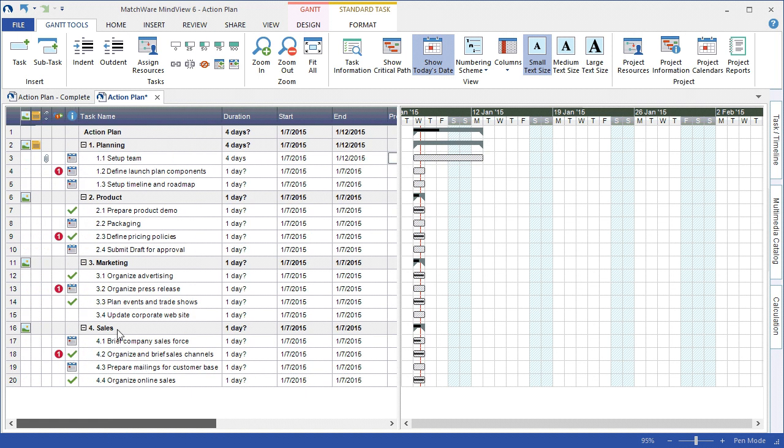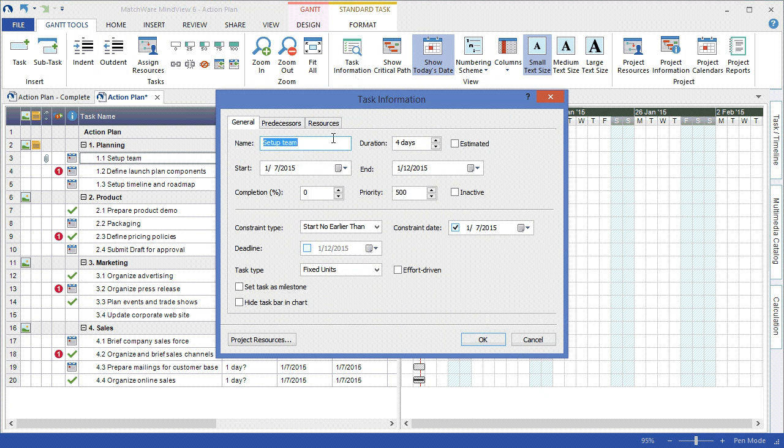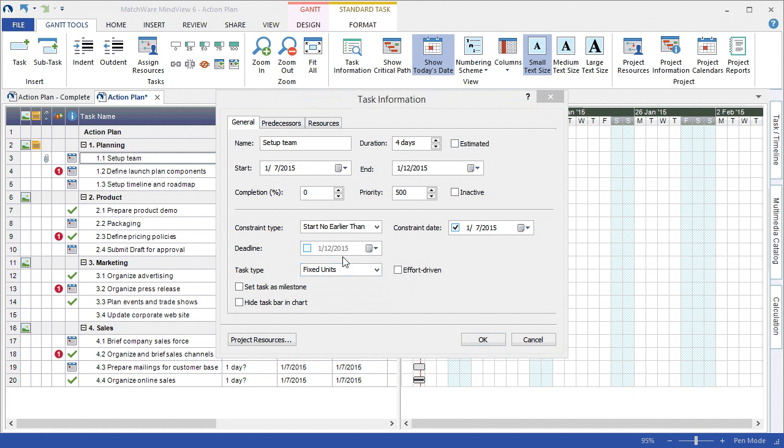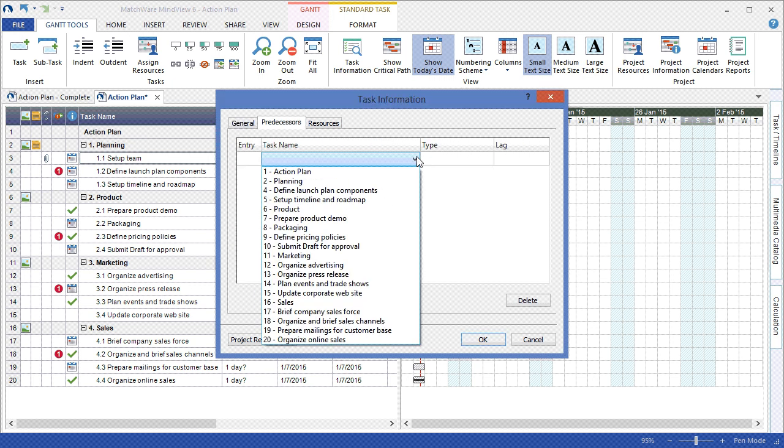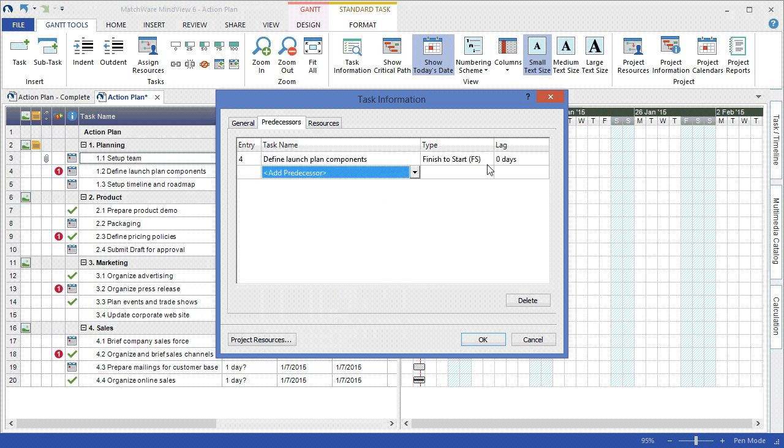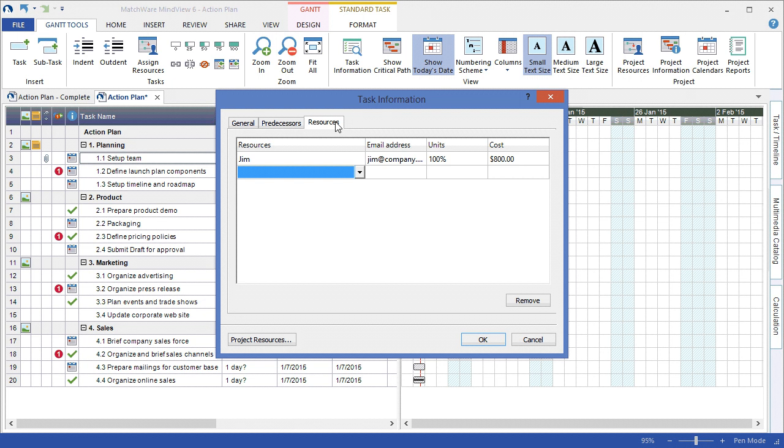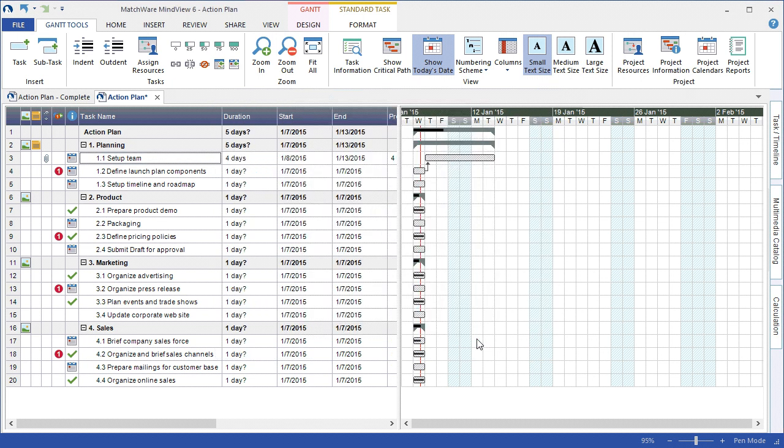By selecting my desired task in the outline, I can navigate to the Gantt Tools tab and choose Task Information. Here I have access to change the name and the corresponding topics. I can choose to apply a constraint. If the task is effort driven, I can associate it as an effort driven task and determine the proper task type. I can even determine to set the task as a milestone or hide it from the chart. In continuing with the tabs, I can choose the Predecessors tab and associate a dependency or predecessor to the selected topic. I can choose the specific predecessor type and associate any lag time. The individual resources applied to that particular task can be listed within the Resources tab, and I can associate multiple resources as needed. I also have the flexibility to left-click and drag to quickly create dependencies between branches.